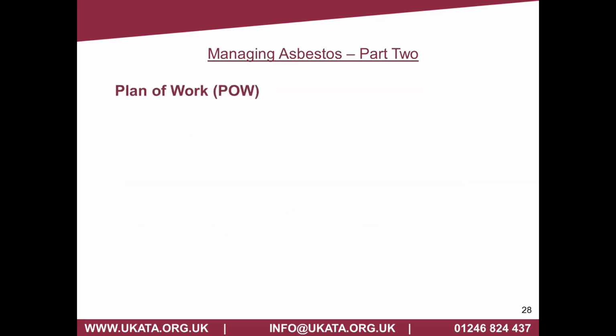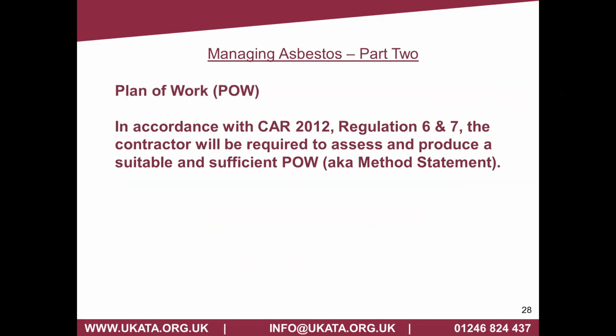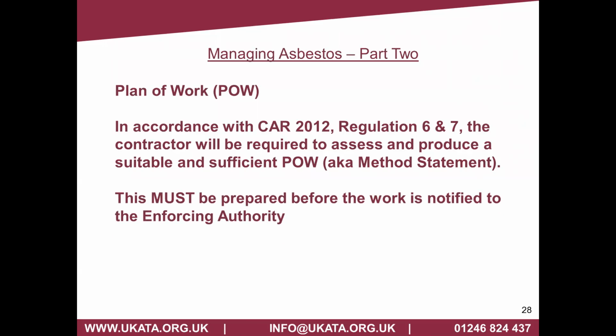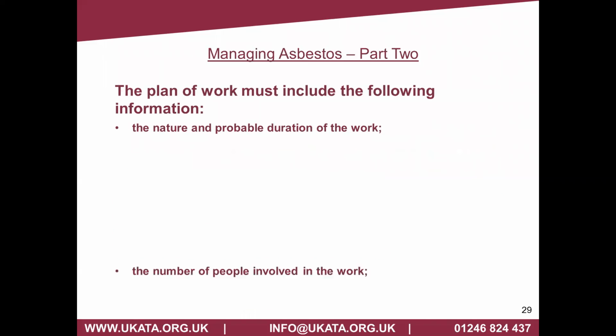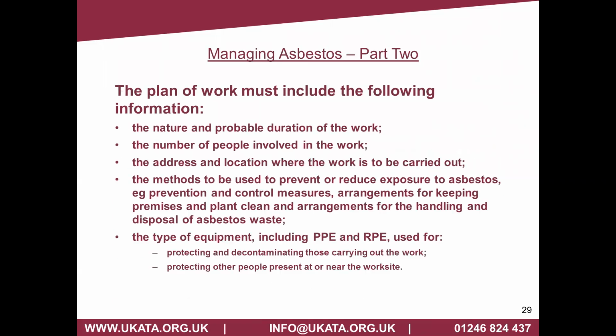The plan of work will be submitted to clients in accordance with CAR. Regulation 6 is assessment. 7 is obviously the method statement or plan of work that needs to be prepared. It needs to be job and site specific. Must emphasize, it must be prepared before they do the notification, and that needs to be job and site specific. Now, again, on a lot of training courses, we go into plans of work in quite a lot of detail, but this is obviously quite a short webinar.